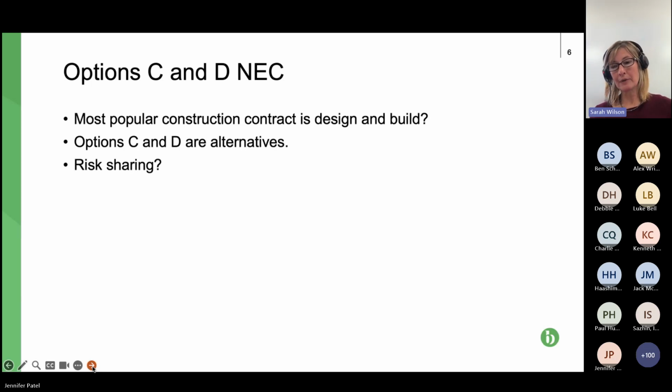So in particular, as I've already alluded to, with option D, the bill of quantities, there is the potential for an element of remeasurement. And the risk sharing comes, as I've already said, depending on whether the actual price of the work comes in under that target, so under the figure in the activity schedule stroke bill of quantities, or exceeds it. So if we can have the next slide, please, Jen.